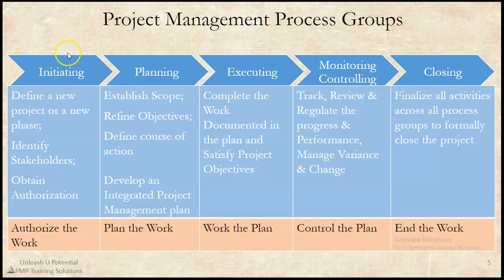First is initiating. Just think about your manager coming to you, giving you a piece of paper and saying that this is the concept document from the CEO. You are the project manager. You and your manager know about that new project coming into the organization. But you need to get a lot of support from the organization, right? That is where you prepare the project charter. At initiation, you prepare the project charter and you get the signature from the management.